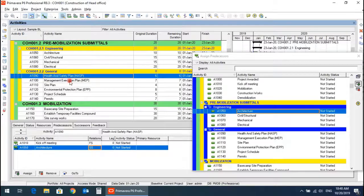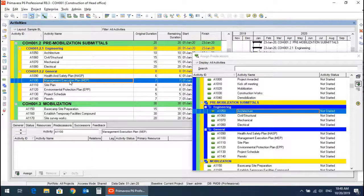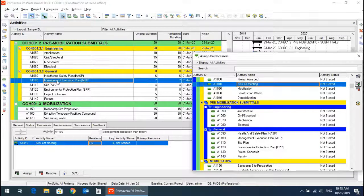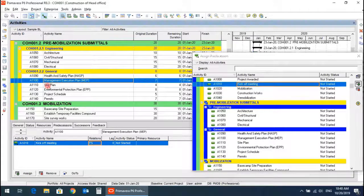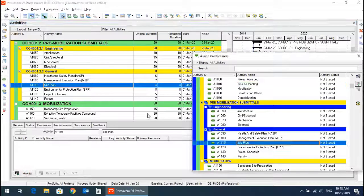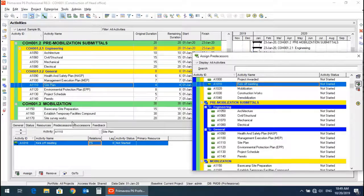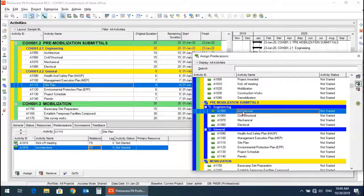The management and execution plan has the predecessor of kickoff meeting. The site plan has a predecessor of kickoff meeting plus a predecessor of architectural drawings.